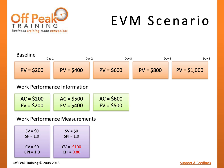On Day 3, you only complete half of Task C and have spent another $100. Since we have accomplished two and a half tasks and had three tasks planned, we have only completed 50% of the project scope. Since all work is valued at $1,000, 50% of the work equals $500 in Earned Value. Since we earned $500 but planned to be done with $600, our Schedule Variance is negative $100 — we are behind schedule. We earned $500 worth of work but spent $600, so our Cost Variance is also negative $100 — we are over budget. Our indexes indicate that for every day planned, only 0.83 days of work have been accomplished, and for every dollar spent, only $0.83 of work has been accomplished.